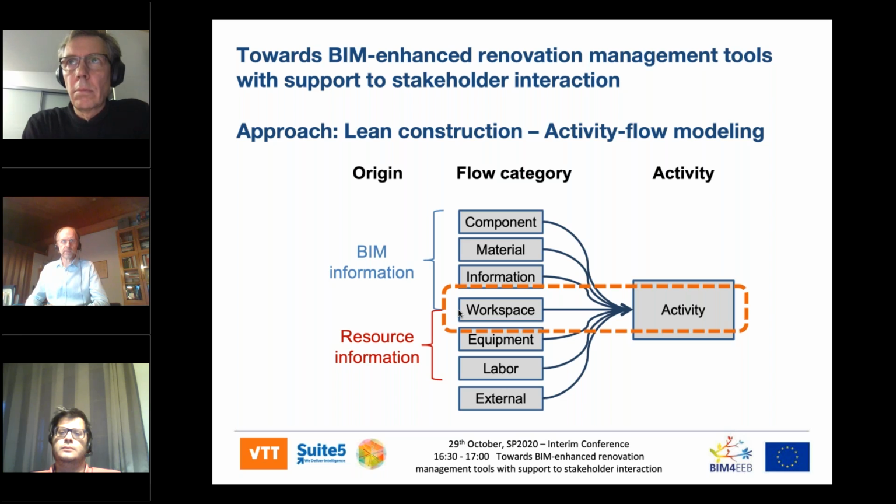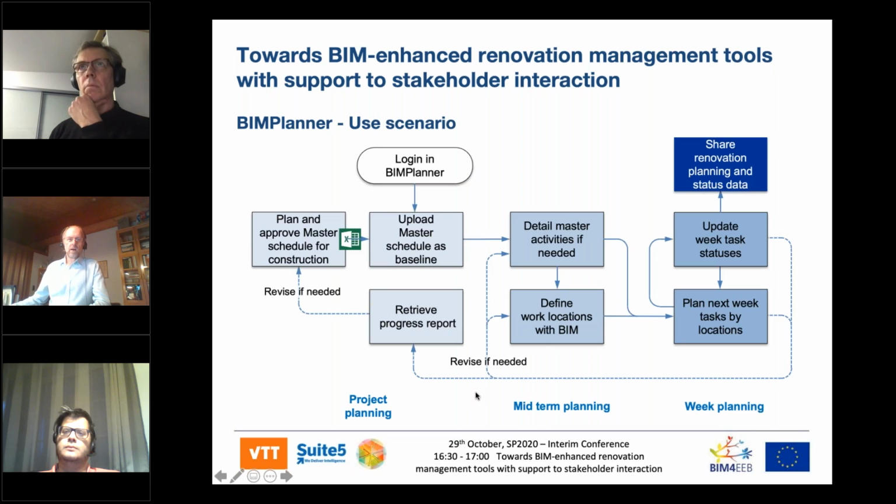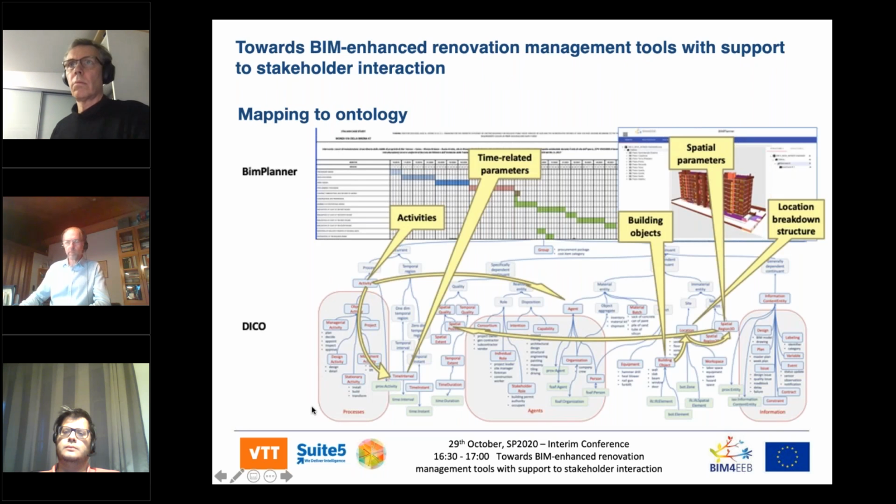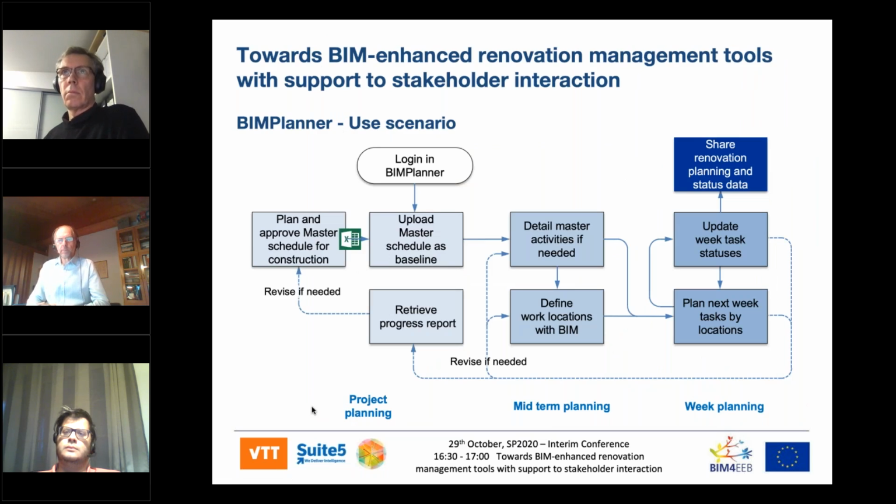So all activities at site, we are dividing by the work locations in order to be able to track that, to divide the activities into smaller parts or shorter duration tasks to be able to manage the process at site. And this is the use scenario of this BIMPlanner tool.